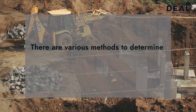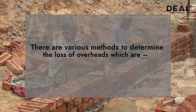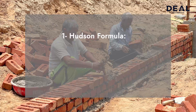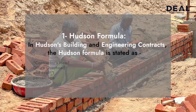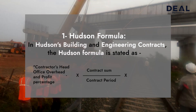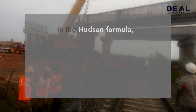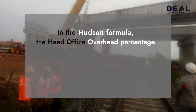There are various methods to determine the loss of overheads. 1. Hudson Formula: In Hudson's Building and Engineering Contracts, the Hudson Formula is stated as — contractor's head office overheads and profit percentage multiplied by contract sum divided by contract period, multiplied by period of delay. In the Hudson Formula, the head office overhead percentage is taken from the contract.